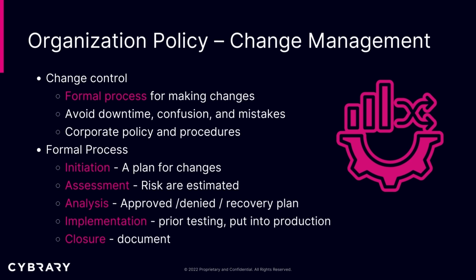Now, to alleviate these kinds of business disruptions, organizations have adopted a process that plans for the changes with safeguards built in to prevent the disruption of the business operations and be as less impactful as possible. This process could be called the change control process. Some organizations may have another name for it, but its sole purpose is to allow for requested changes to be reviewed by the required stakeholders and to identify any potential problems that could arise during the implementation before it's implemented.